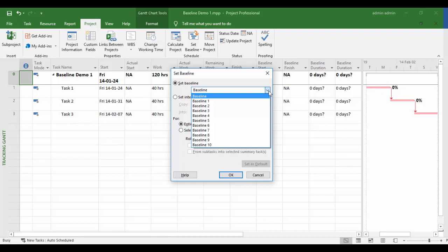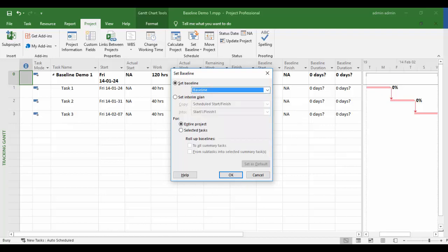Typically, all change requests would require you to reuse a baseline, which we will demonstrate as part of scenario number 2. In this way, it is possible for you to later compare the performance of a particular phase across multiple projects, past and present, so that you can review your estimating accuracy.